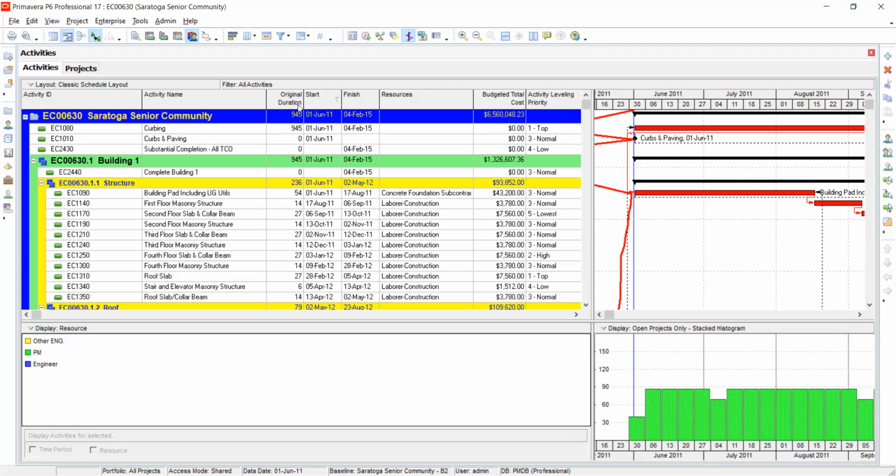So you can do this in a project and compare. If I just optimally utilize my resources, this is the duration I'm going to take. Then you compare with the other one where you may be exhausting. If the difference is not so big, you just go with this, or it just depends. It all depends on when you want to finish the project.